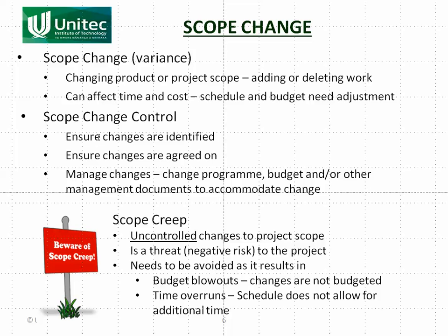To control it, the first thing that needs to happen is you need to make sure that the change, the variance, is identified. You can't correct something if you don't know it happened, and in engineering it happens quite a lot. Something will happen, like for example, you'll strike some rock, and you'll just go ahead and pull it out or something like that, and you won't change the budget, you won't change the program, and then you find that you're running over time and running over budget. So it's very easy in engineering to miss the changes.